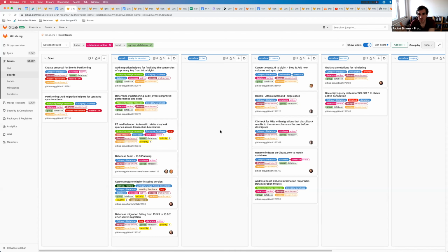The milestones are essentially GitLab's release policy, right? For self-managed. They have actually nothing to do with our ability to develop those things, right? But what we need to do, because GitLab operates on milestone planning, right? And we, in this instance, is mainly Yannis, hopefully in the future with help of the team, is to say, okay, it's the 12th. This is the epic we're going to focus on in the next milestone in the next month, right? And these are the issues that we are very likely going to work on, right? And then they can go into ready for development. We can label them accordingly. That's fine, right?